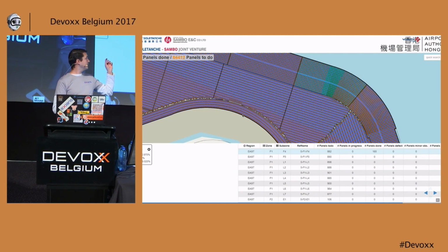And every orange block you see is really a pile, a piece of foundation they have to make. Now, in total, they have to make like 63,000 or 67,000 of these drill downs, and they really want to have a tool to say, okay, where are we in doing the entire project, and for each pile we want to have a level of detail. So this was our first challenge: how can we do the follow-up? How can we make it visual and clear to the team leaders or the project manager on site, but also in the office in France, what the project status is?